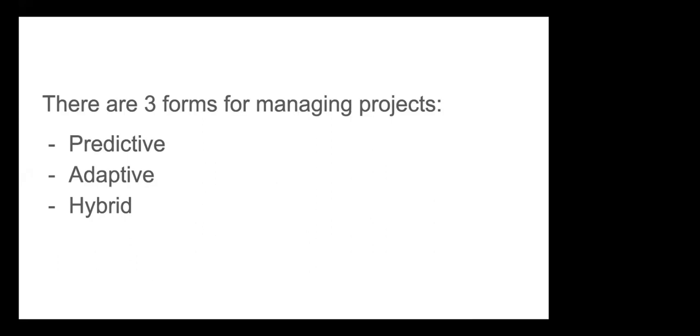Can you take that decision on your own? No, not at all. Anything that will change the cost, the schedule, or the scope is something where, like rightly said, the processes involved will be much. In my industry, it involves change in scope and so on. So you undergo what is called management of change, and it's not a linear activity. It's very robust. It's called MOC, management of change.